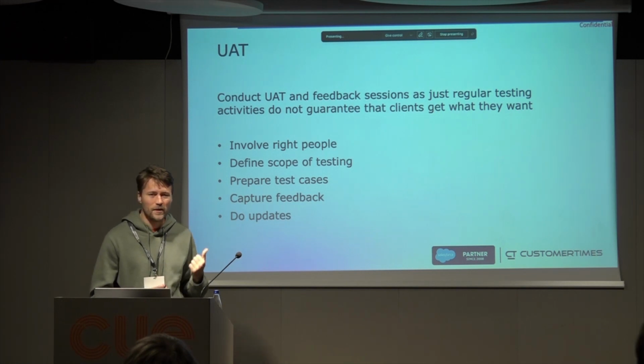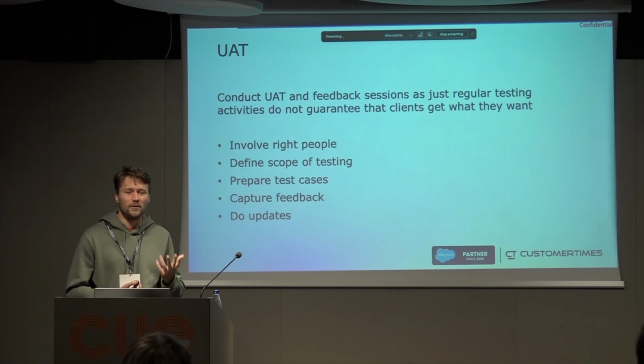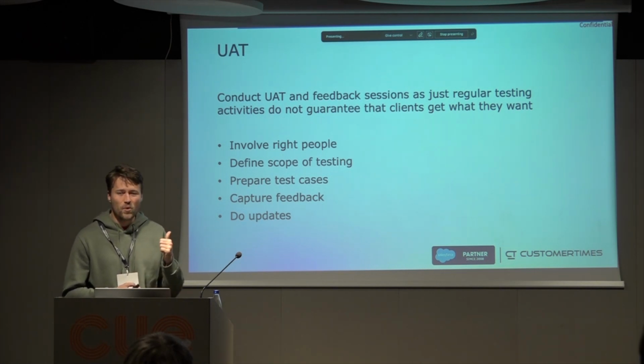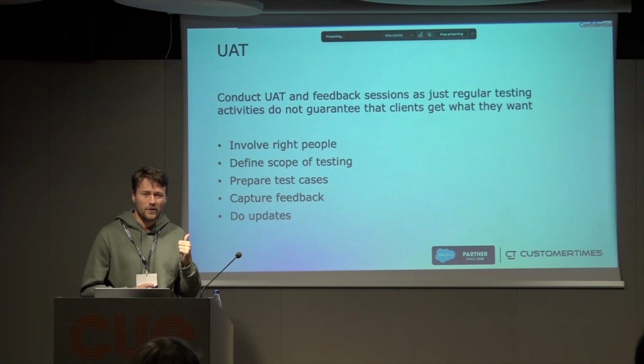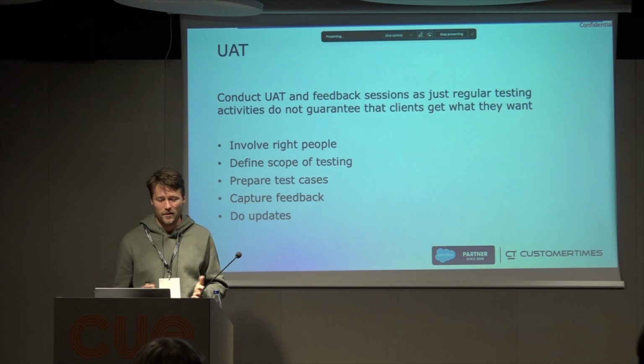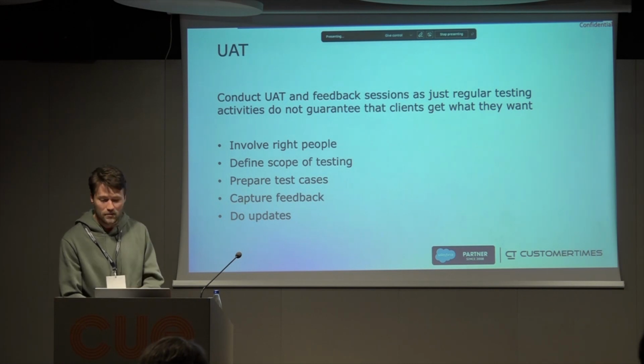If you didn't involve them and don't do the UAT sessions, you can develop a solution, and maybe if UAT happens quarterly, you will face that after the entire quarter of development, you bring the solution in place that's not actually fulfilling the client's needs. Of course, the Scrum ceremonies and so on will cover that, but the best way is to cover it with the UAT sessions and the demos as well.